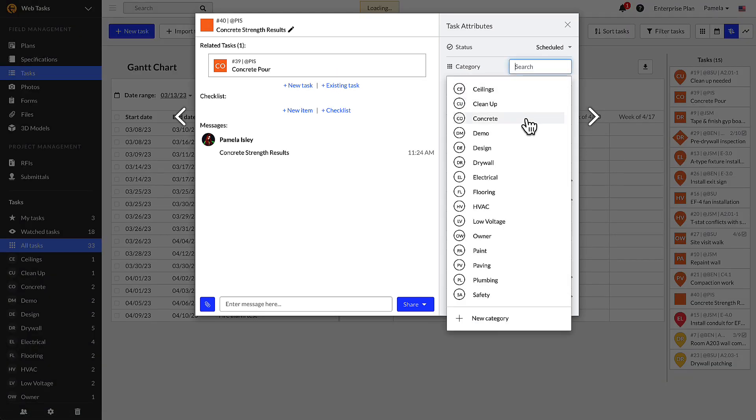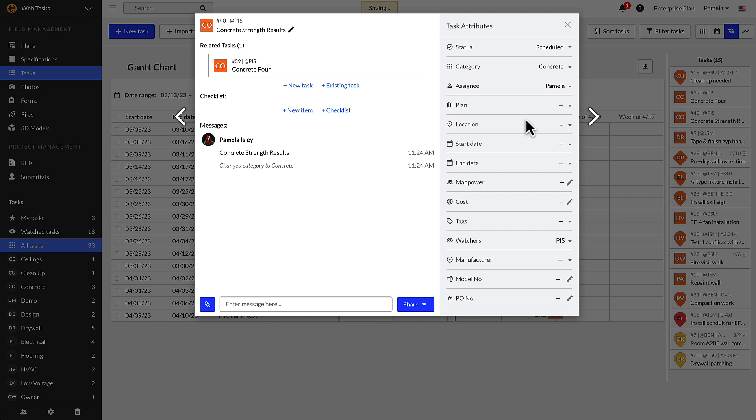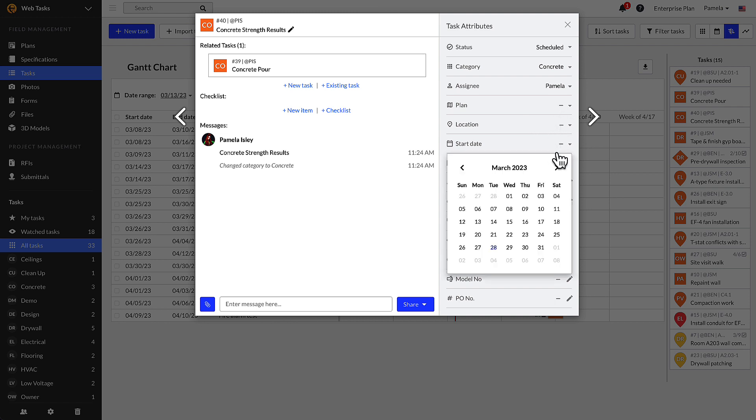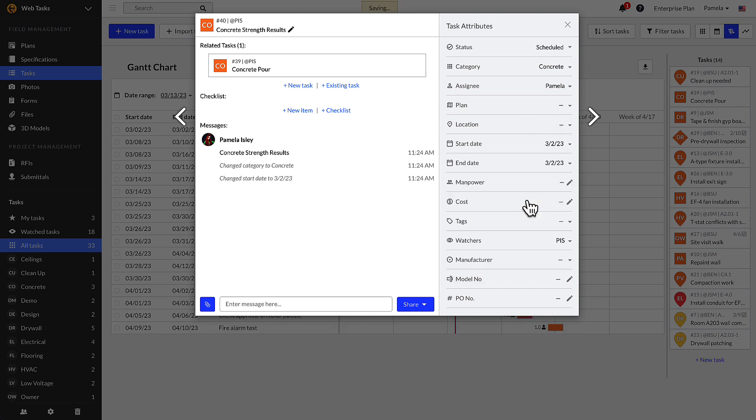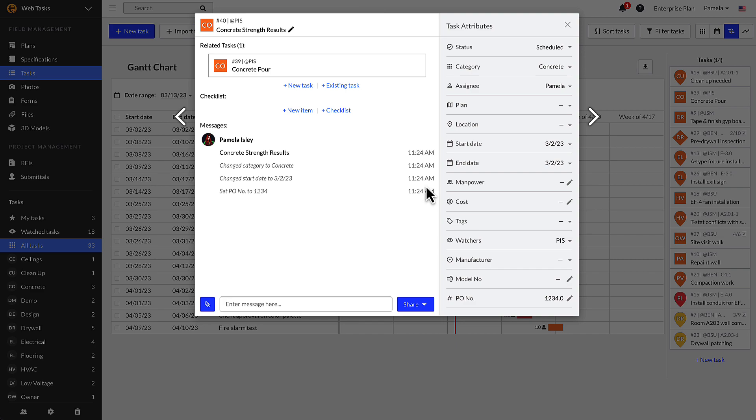You are able to update any of these task attributes. Depending on the attribute type, you may have a dropdown, calendar, or a text slash number entry. Click on the attribute to populate or update it, and Fieldwire will record when changes are made, so you can track project progress.